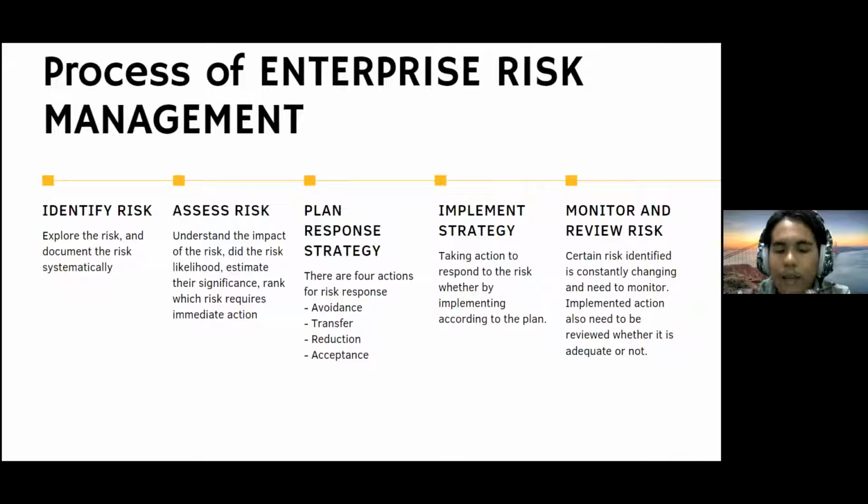And then we have to estimate the significance of the risk, whether the risk will bring greater damage or less damage. So after we assess, the risks that we need to take care of most are the risks that are imminent, which will happen soon, and the risks that have greater significance to the company. So next is the plan response strategy.